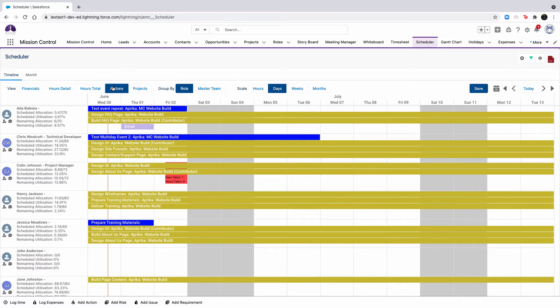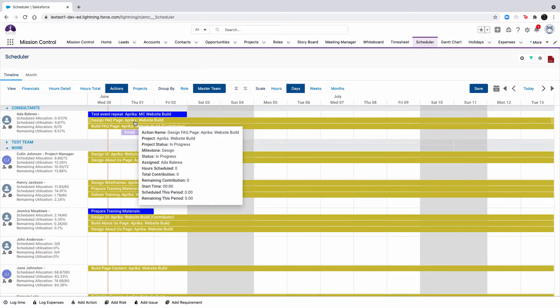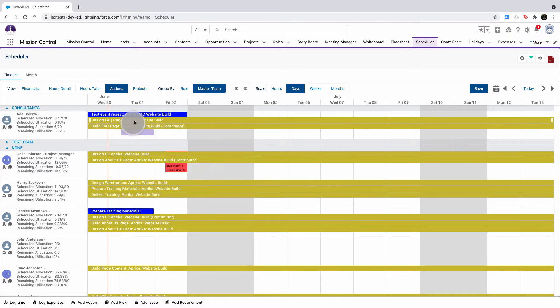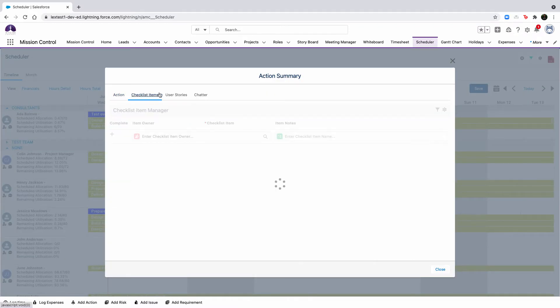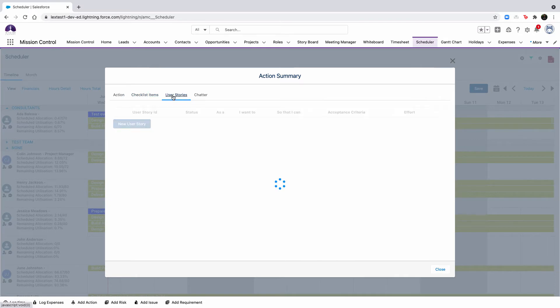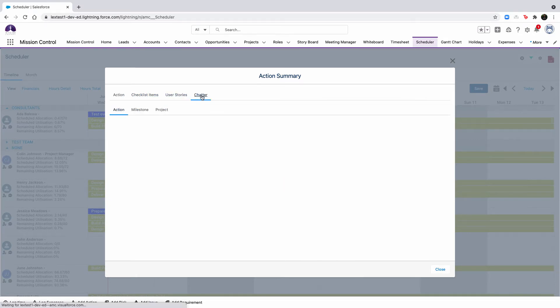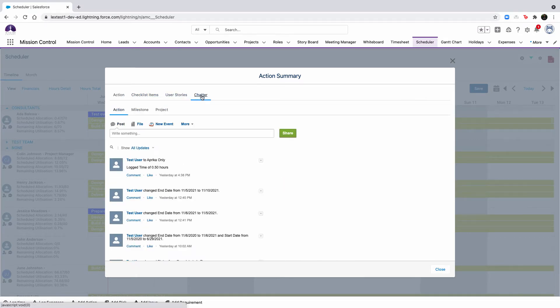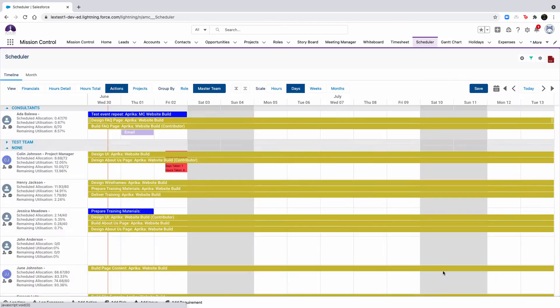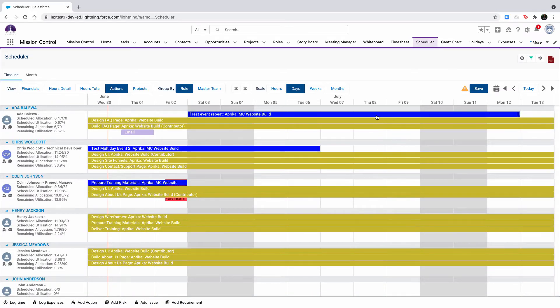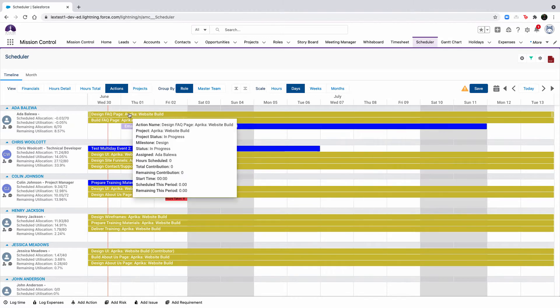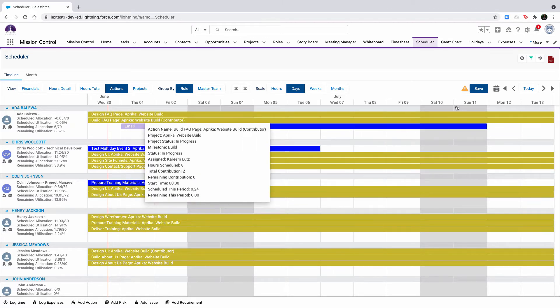To make edits, double click the action to open the action summary component. This will give you access to the action detail page, related checklist items, related user stories, as well as the chatter feed. You can drag and drop actions to reschedule to a different point in time or adjust the number of days that are assigned to the action.